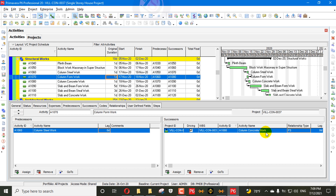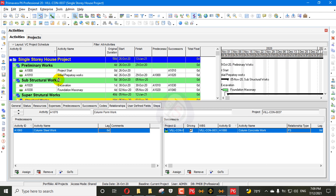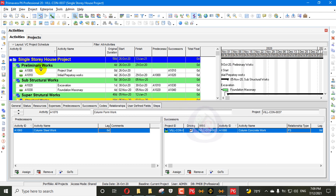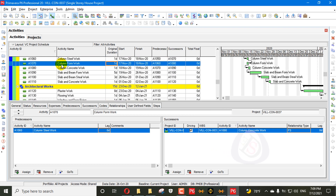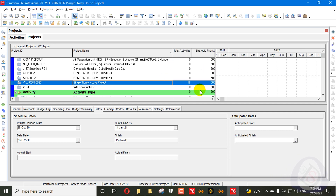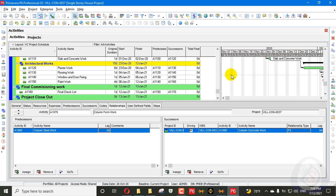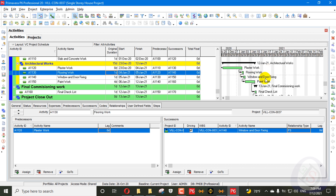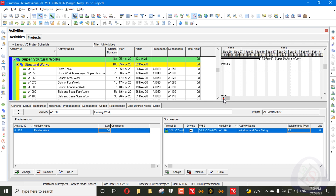The scheduler's intent is not to specify start and finish dates for each activity with constraints, but to include logic that automatically computes each activity's start and finish date. In this way the scheduler ensures a dynamic schedule that responds well to duration updates. I have a single story house project schedule with 18 activities — a short schedule to help you understand dangling logic completely.